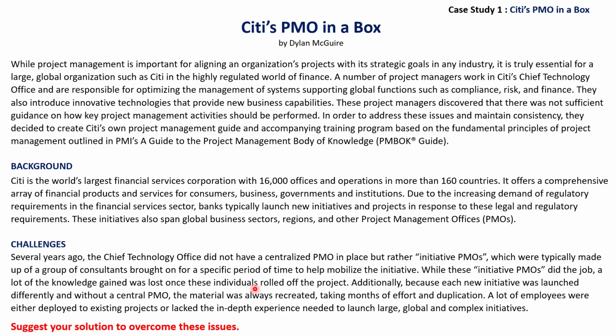So all these things happen because they don't have a centralized body of knowledge. If you have a physical project management office, that means it's a centralized knowledge center, right? Everything, how other projects were implemented, what lessons they learned, what problems they faced, and how they resolved them. If we put all these things in a particular central place, that is the centralized project management office.